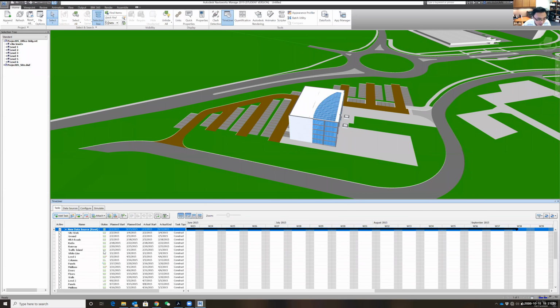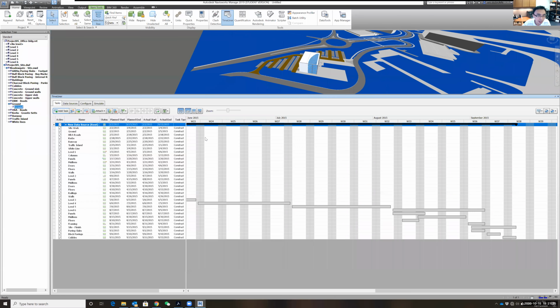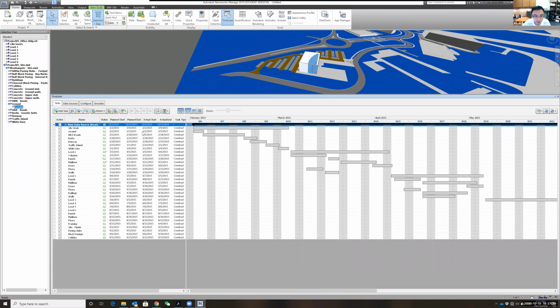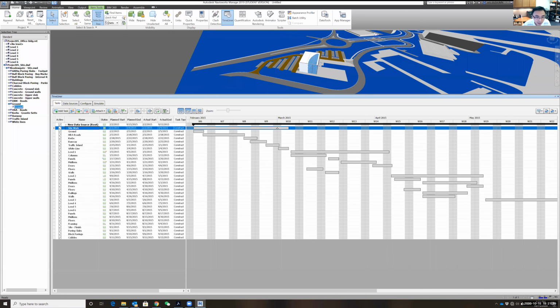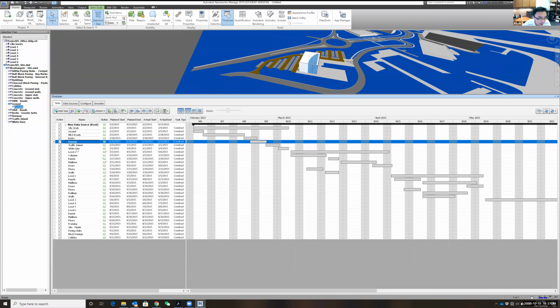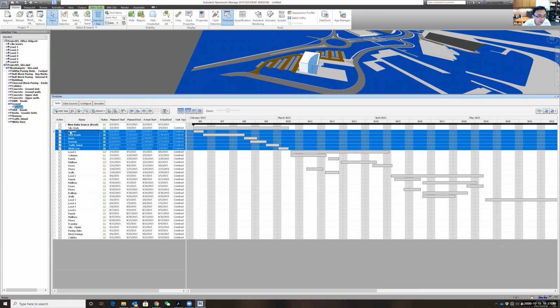All right. So now let's see how it looks. I'm going to make this part larger since I'm working on the schedule right now. You can see I have the schedule, the list of activities. I'll have the Gantt charts ready, but I know the hierarchical structure is not correct because this set work is here, and the ground, HRA roads, curbs, all the way to the white line should be the sub-tasks underneath the set work. Make sense? So this one should be level 1, this activity should be level 2.